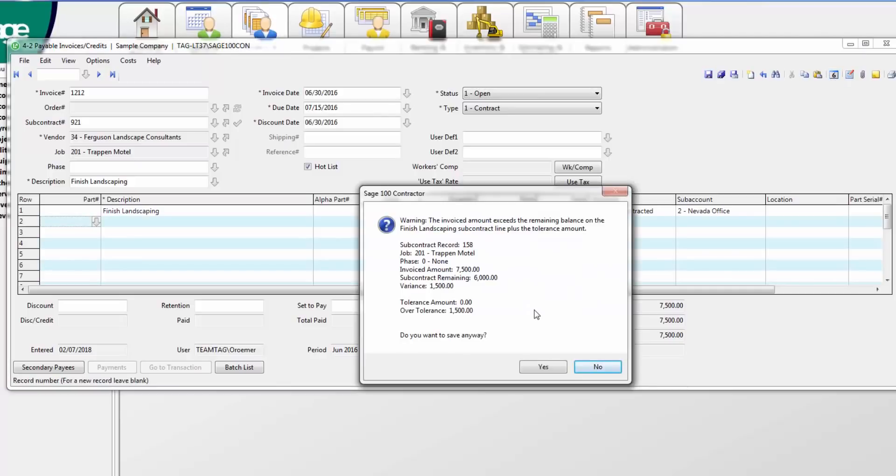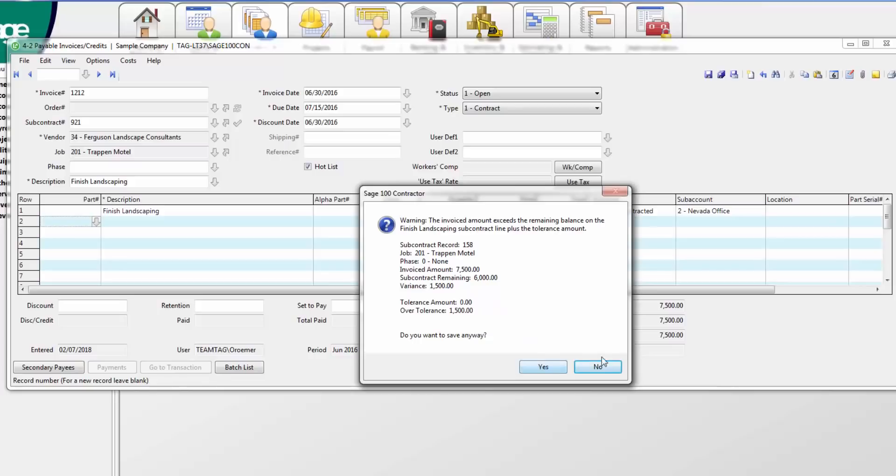Once I hit save, notice that it will tell me that I'm trying to invoice for more than the subcontract amount. I have a couple of options based on security settings. I can either go ahead and continue or I can hit no and enter in a change order for the difference.